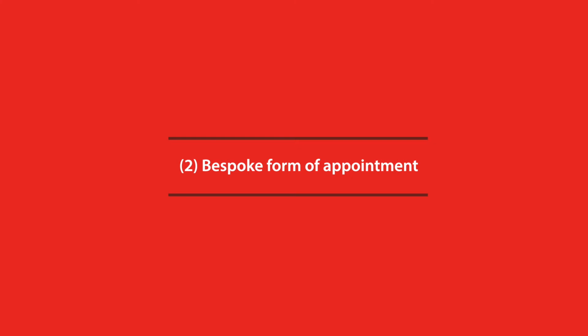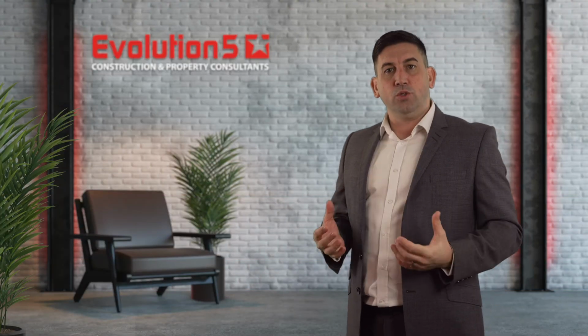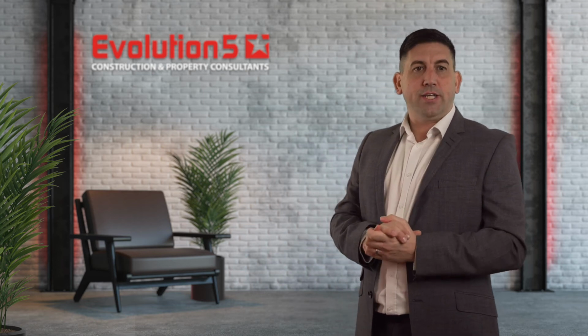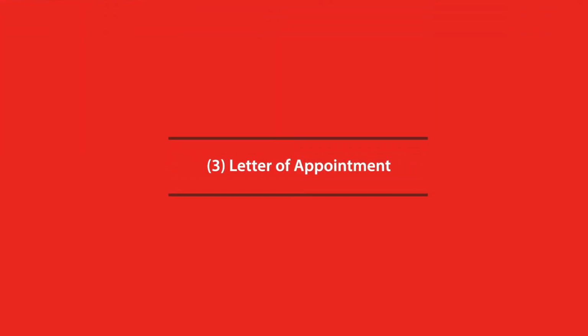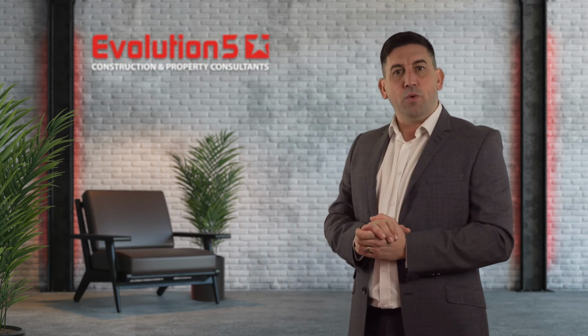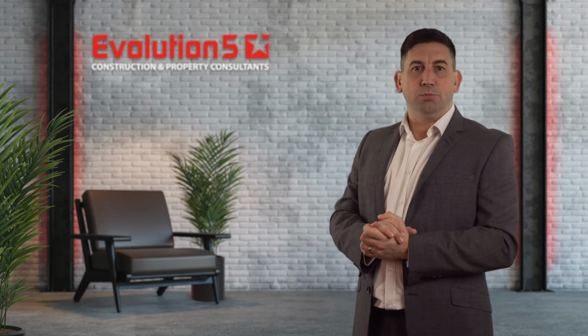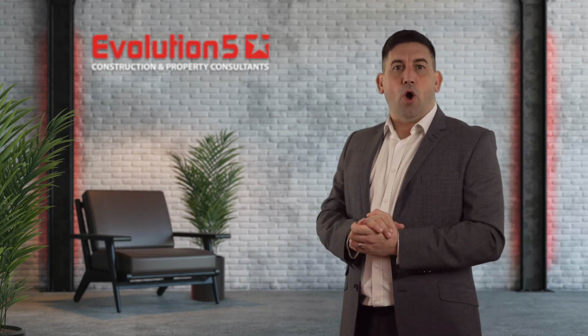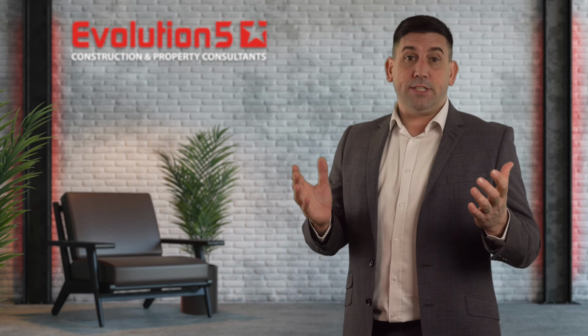Two, bespoke forms of appointment. These are either drafted by legal advisors for the consultant organisation to use on projects or for the client to use on a one-off project or projects. And then three, letters of appointment. Most consultants will produce a fee proposal with all the relevant information with embedded terms and conditions of engagement, the offer, and a section for the client to sign if they wish to proceed, the acceptance.